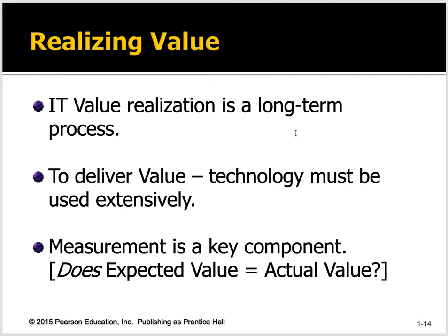Realizing IT value is a long-term process, but it has to have some short-term results. When I said it's similar to the capital budgeting process, most companies I worked for wouldn't get approval for a capital project unless it met certain ROI thresholds within 18 months — it's usually got to pay for itself and start delivering that extra savings and profit within 18 months. If it doesn't do that, most projects weren't considered. To deliver value, technology has to be used extensively. Measurement is a key component of all this.